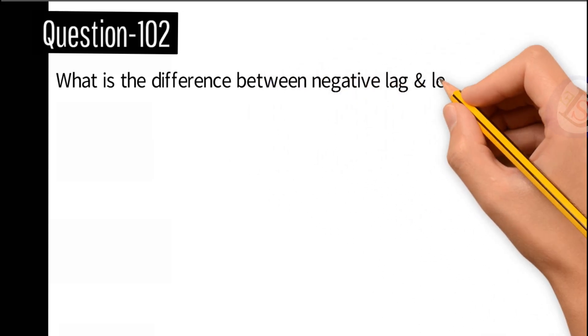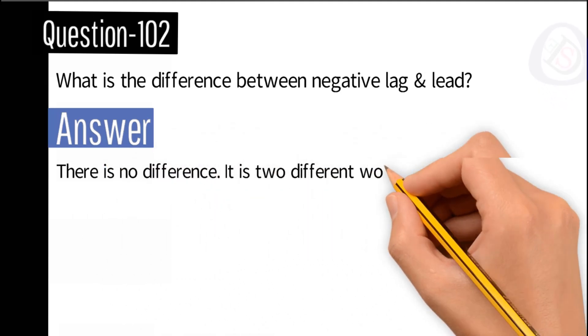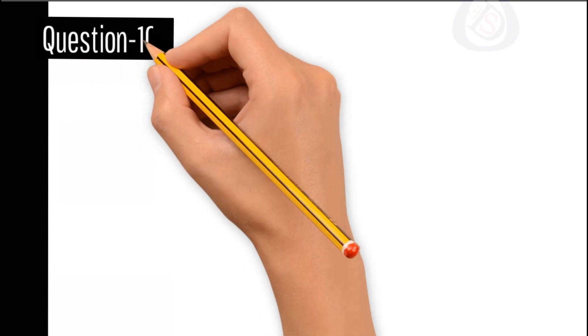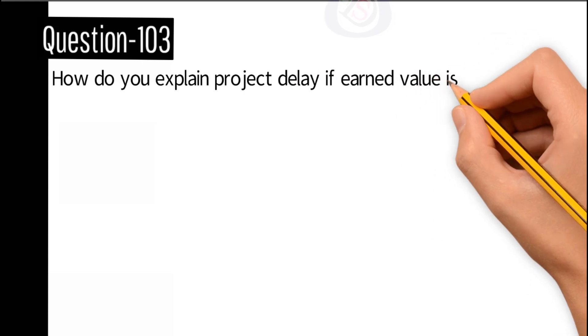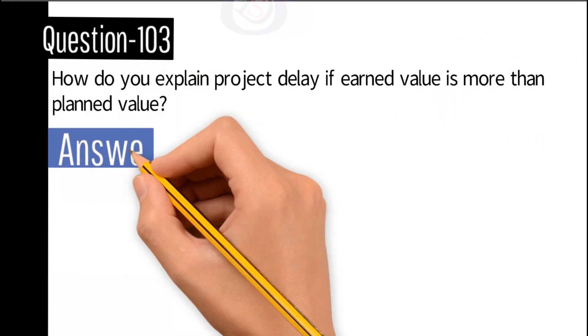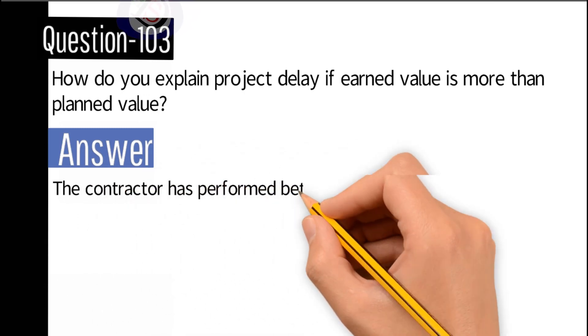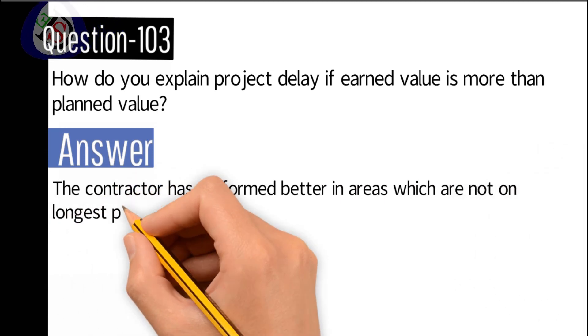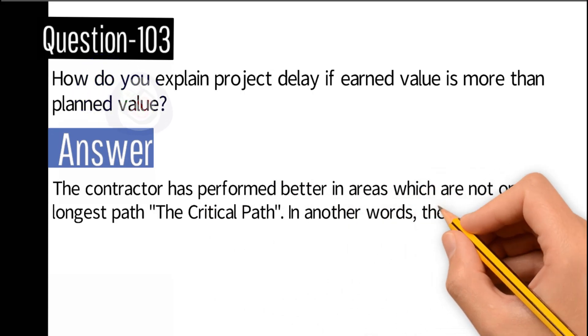Question number 102: What is the difference between negative lag and lead? Answer: There is no difference. It is two different words of the same meaning. Question number 103: What do you explain project delay if earned value is more than planned value? Answer: The contractor has performed better in areas which are not on the longest path, the critical path. In other words, the contractor executed the right quantity in the wrong place.